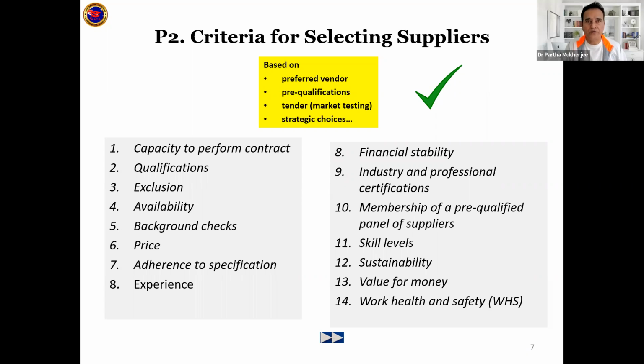Now you know all the tendering process. For large contracts, there will be newspaper advertisements, and forms will be given. People will take those forms and take the entire requirement from you in dossiers. Those documents could be a couple of pages to maybe hundreds of pages. Then they will put the tender in a sealed envelope to you on or before the specific day. So why do you do tendering? You do tendering because it's called market testing. What is market testing? Testing the market to see where I can get the best quality at the best price. So that's the tendering process.